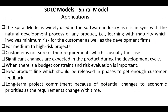The spiral model is widely used in the software industry as it is in sync with the natural development process of any product, i.e., learning with maturity, which involves minimum risk for the customer as well as the development company. It is also suitable for medium-to-high-risk projects if the customers are not sure of their requirements, which is usually the case. It is also applicable when significant changes are expected in the product during the development cycle, when there is a budget constraint and risk evaluation is important. New product lines should be released in phases to get enough customer feedback, and long-term project commitment because of potential changes to economic priorities as the requirements change with time.